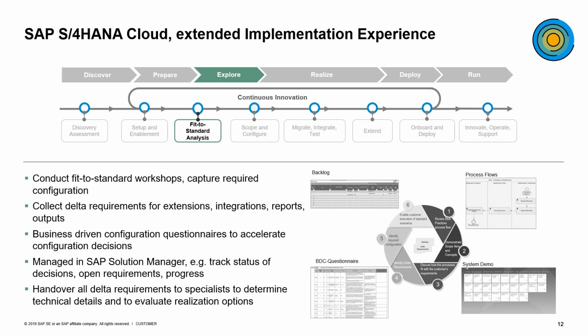The next phase is the Explore phase. In Explore is where you will go through the fit to standard workshops. During the workshops, you want to capture any requirements that come up during discussions and review of the standard system. Specifically, we want to capture Delta requirements that are linked to extensions, integrations, reports, and outputs.